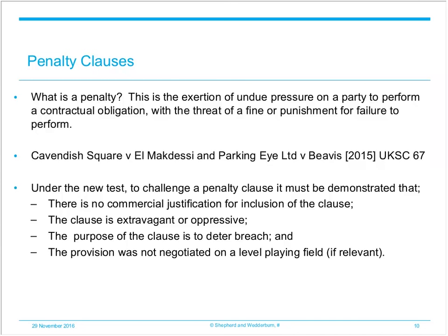So the law has more recently moved on from a simple dichotomy between liquidated damages clauses on the one hand and penalty clauses on the other, depending on whether or not each are based on a genuine pre-estimate of loss. It is now no longer sufficient to show that the clause is not a genuine pre-estimate of loss, and there are now other considerations for a challenge to these clauses to be successful.